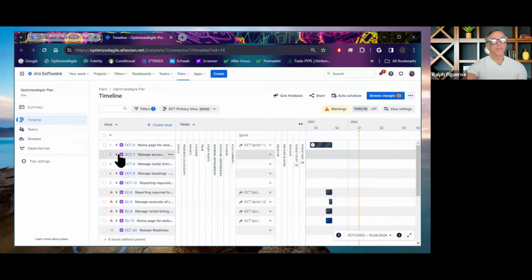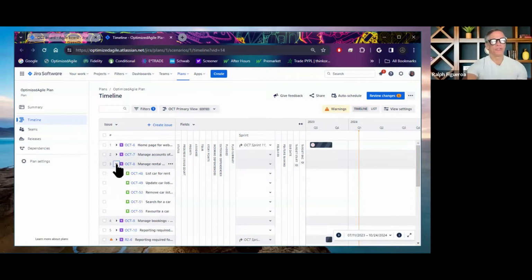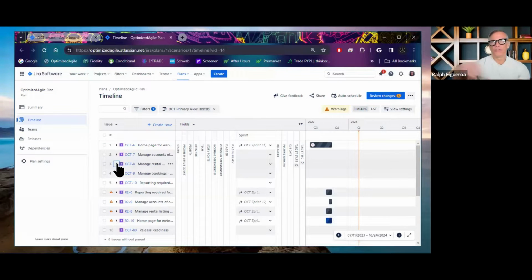And now I can see the epics, the features assigned based on planning sessions that have occurred, big room planning or PI planning or release planning, whatever format that you choose. Using the fixed versions with discipline, you can actually then tag and filter for those artifacts. And for the future, the same thing, right? You have fixed versions that are created that represent future releases, and you leverage the fixed version, and then you can use the filters within Jira Advanced Roadmap to show that in the context of a timeline, right?